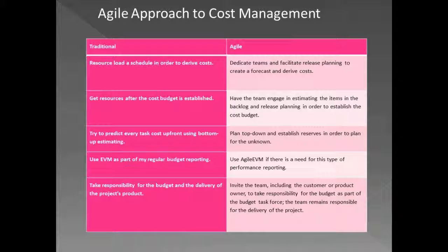In the traditional earned value method, we have the sum of all the work packages, like the schedule estimates, their duration and effort. In agile, we have the number of story points planned for a particular release, and this could translate into an agile approach for the performance measurement baseline.